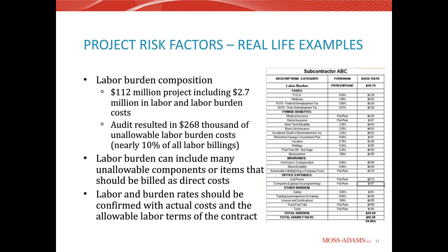I think traditionally we see somewhere between 28 to 35% of total labor cost is labor burden. So usually when you see a percent that's that much higher, a red flag goes off that there probably is more cost in there than what we would consider true labor burden, which is the taxes and insurance.